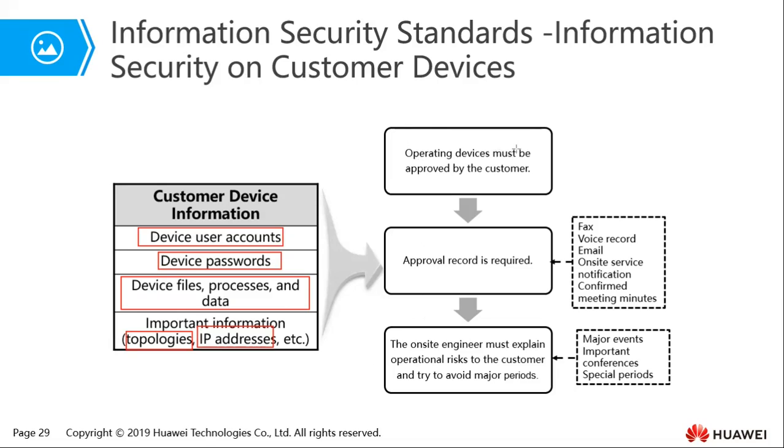Operating devices must be approved by the customer. Remember, in the risky implementation process, 10 minutes before you begin, you need to sign some authorization forms. So you cannot just go in and start operating devices. Most of the time, you need to sign a document for that.